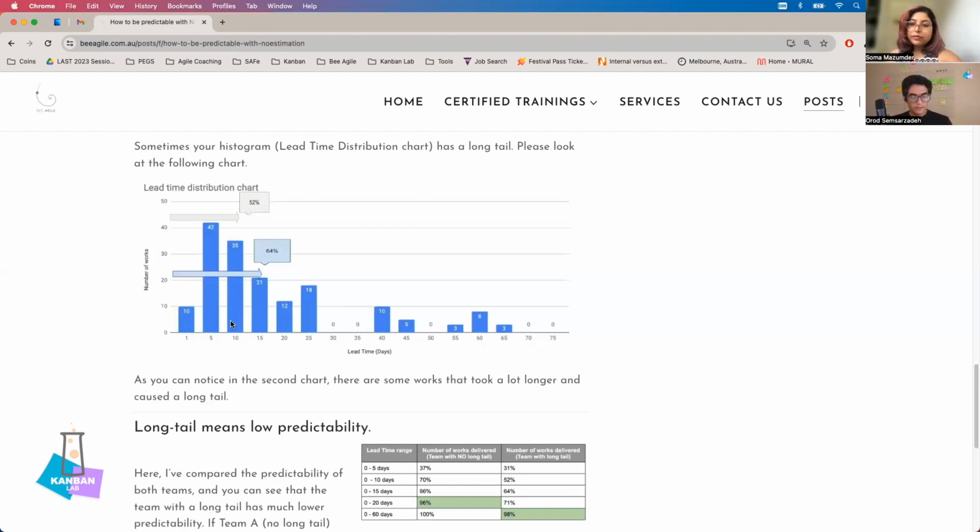You raise actually a really good point. So ideally, what we need to do is have a different histogram for different types of work which come from different customers, right? And when we look at that, you might realize that we delivered 100% of the work for customer one, but for customer two, we delivered maybe 40% within the expectation. So that's also another really good point.